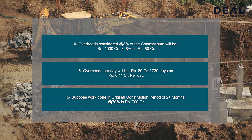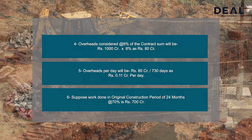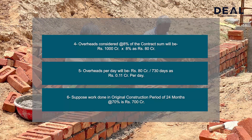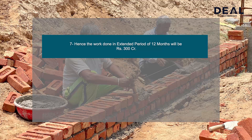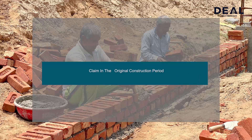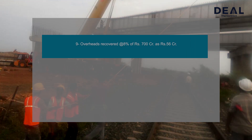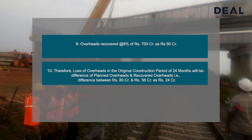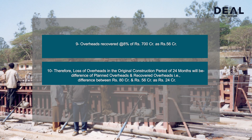Suppose work done in the original construction period of 24 months is at the rate of 70%, i.e. Rs. 700 crores. Hence the work done in the extended period of 12 months will be Rs. 300 crores, and the claim in the original construction period is Rs. 500 crores. Therefore, loss of overheads in the original construction period of 24 months will be the difference of planned overheads and recovered overheads, i.e. Rs. 80 crores minus Rs. 56 crores = Rs. 24 crores.